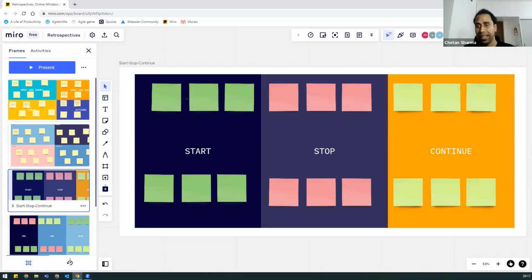What change they are expecting. Now, if we are waiting for the feedback till the acceptance environment, it's like a 5-day process. How can we improve it? The moment I finish the story in my local machine, before raising a merge request or deploying on any environment, within my local system, I will quickly demo in the daily stand-up. Once everyone finishes, I can ask my product owner to just stay for 2 minutes. I will quickly demonstrate, okay, this is the new story. These are the 3 acceptance criteria. See, I implemented this. What's your feedback?